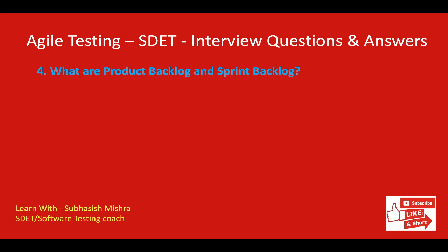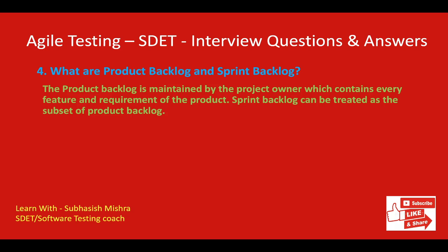What are the product backlog and sprint backlog? Product backlog is maintained by the product owner and contains every feature and requirement of the product. The list of product backlog items are prioritized by the product owner as high and low, and can also be de-prioritized constantly. Sprint backlog is a subset of the product backlog which contains features and requirements related to a particular sprint only.